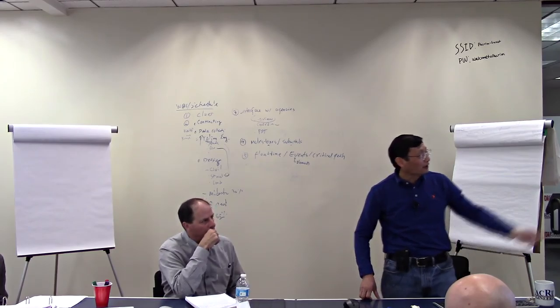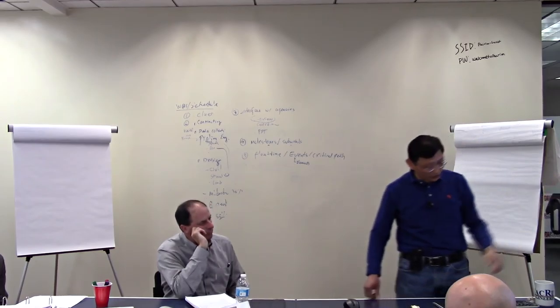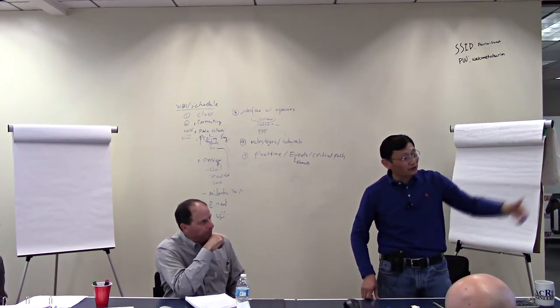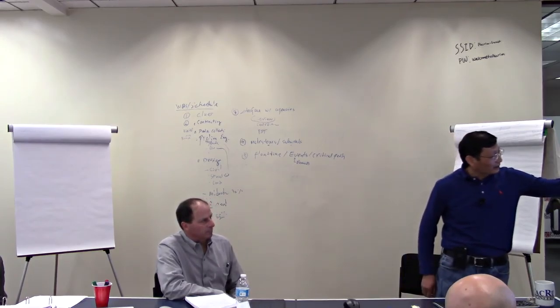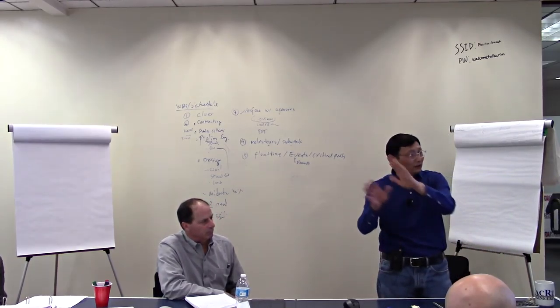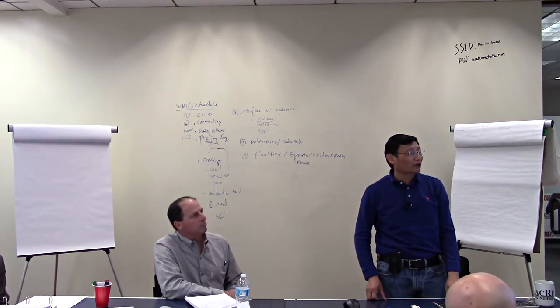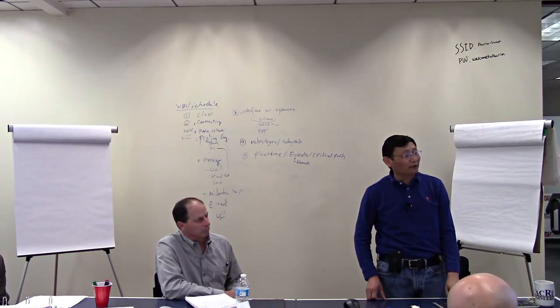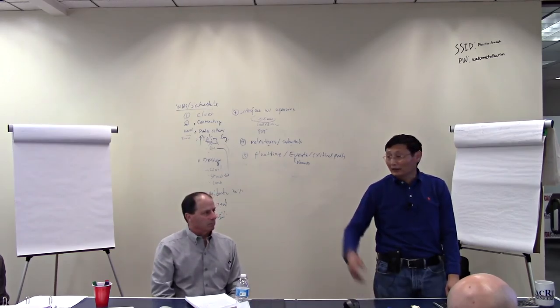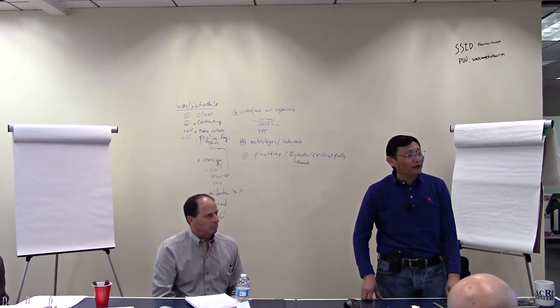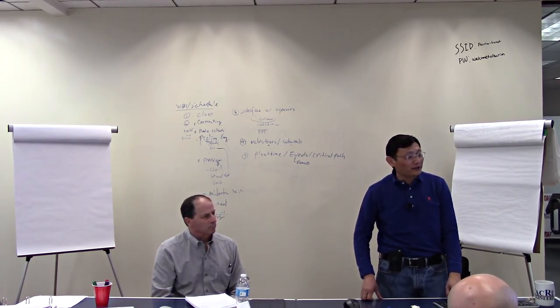And you can go even further. For example, we set up a budget projection: what is the budget amount, who has the budget, and how the planned expenditure versus actual expenditure is all tracked per point in time. And this is reporting, translating into a diagram between planned and earned and what actually occurred. You can do all of that. So we have this kind of spreadsheet set up already. If you happen to need to go to that level of detail, we can do that.